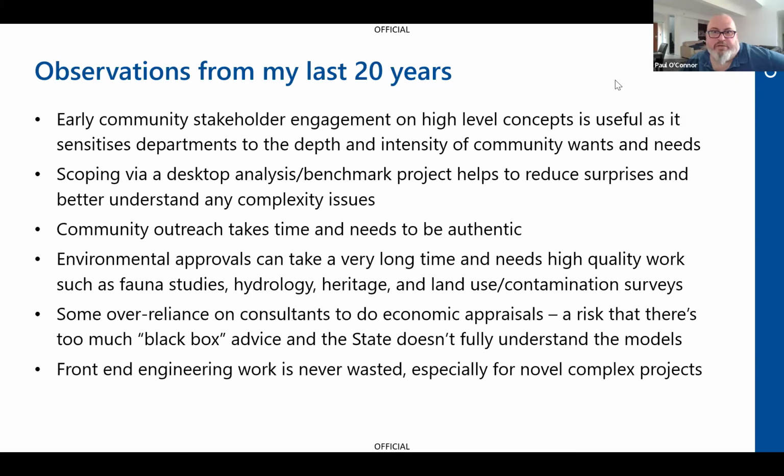So the Metro Tunnel, for example, they had a whole project design done, really. They had working designs well before they had engaged with the market, because they needed one to do the EIS. So they needed to show conceptually how the project would work and where they would locate key equipment and tunnel boxes and escape shafts and everything. Because unless they had that, they couldn't complete the EIS. They had to show where the cross passages would be.